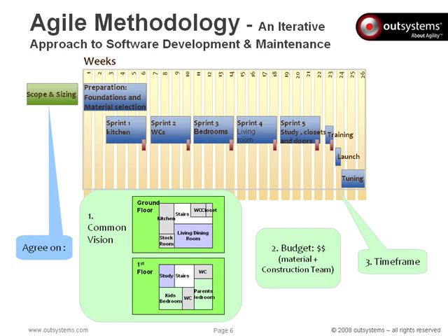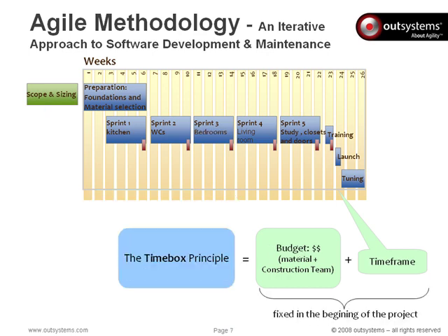One of the major principles that will lead our project is called the time box principle. Remember, my family will be homeless in 6 months, so this is our deadline. Our time box cannot move. The time box principle is effectively a time frame of our project aligned with the budget and project team size. It is set at the beginning of each project.